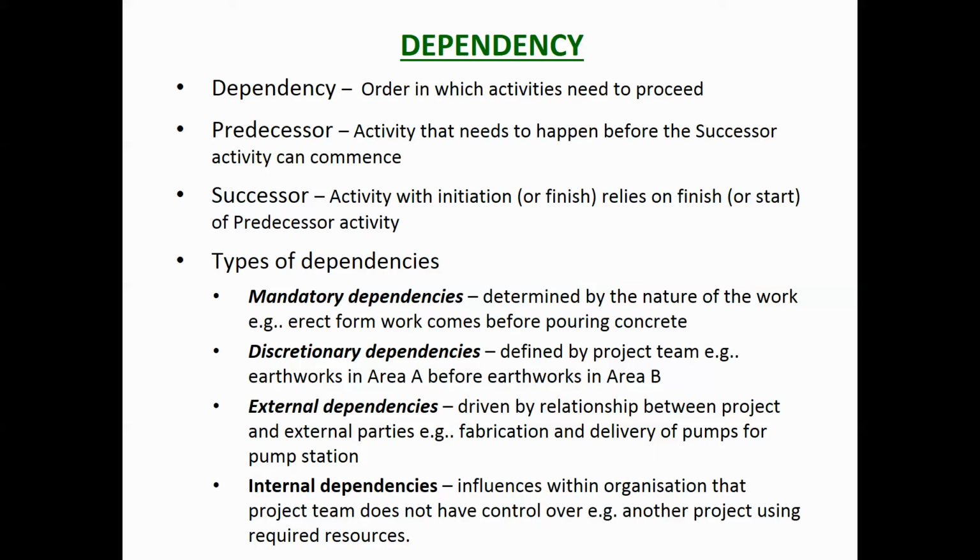You have to erect the formwork before you pour the concrete. So that's a mandatory dependency, it's the nature of the work. Now there may be other reasons for putting in a dependency relationship, and discretionary, which is defined by the project